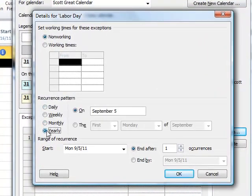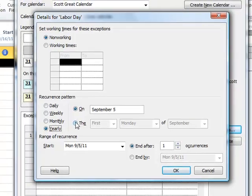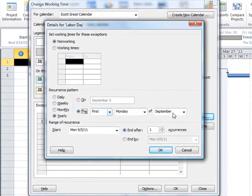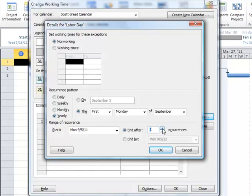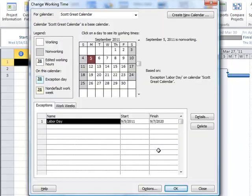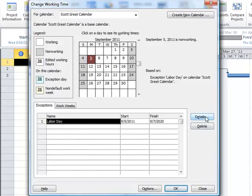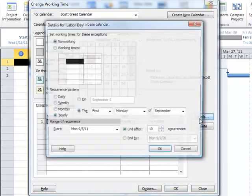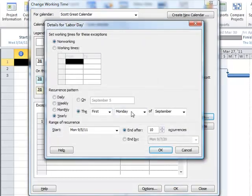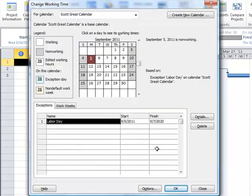So I'm going to say this reoccurs, not on September 5th, but on the first Monday of September. And I'm going to let it go, let's say out for the next 10 years. Okay, so I don't have to do that for every Labor Day. I can simply set a rule with this Details that says that on the first Monday of September, we're going to have a non-working day.